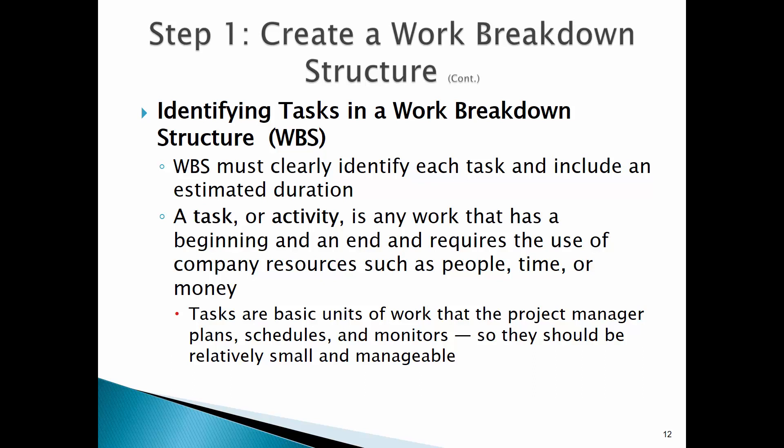Keep in mind as we do this, we have to take into consideration weekends. Is work going to be done on weekends? Most likely not. Here we have this task, task one. It is sequential, which means we have to finish it before we do task two and task five. But task two and task five can be done concurrently. You'll see them done both ways.